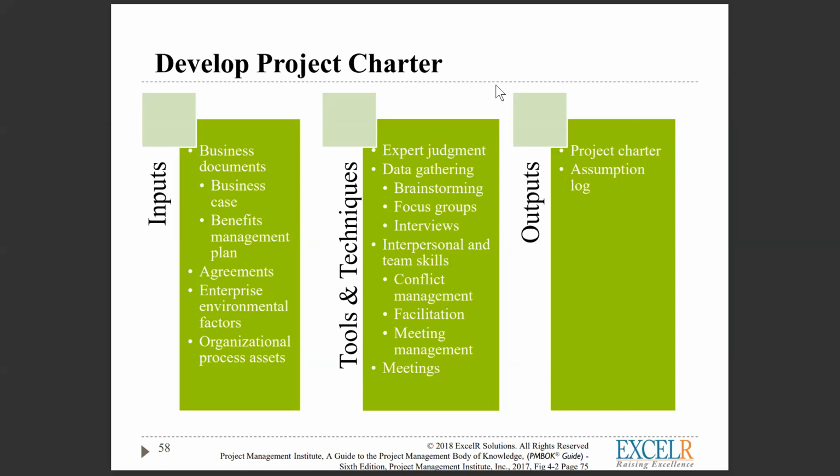How many resources do you require? How many hours? One month? How many days will it be working? Someone will take 21 days, some organization will take 22 days. Actually, as per PMI, it should be 21.8 days. So, how will you calculate the effort estimation?